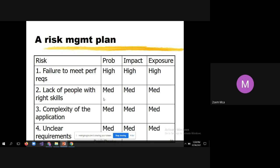For 'complexity of the application,' most companies try to minimize complexity. When developing an application with too many features, there can be complexity. The probability is medium and impact is medium. For 'unclear requirements,' when the client gives requirements, they are converted into a requirements document shown to the project manager and client for approval — any unclear items will be flagged. Probability is medium, impact is medium, and exposure is medium. This is one example of a risk management plan.